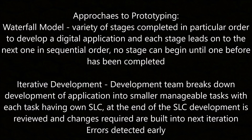Approaches to development. The waterfall model involves a variety of stages completed in a particular order to develop a digital application, and each stage leads up to the next one in sequential order. No stage can begin until the one before it has been completed. Iterative development is when the development team breaks down development into small, manageable tasks, each having its own system lifecycle. At the end of the SLC, development is reviewed and required changes are built into the next iteration. Errors are detected earlier this way.